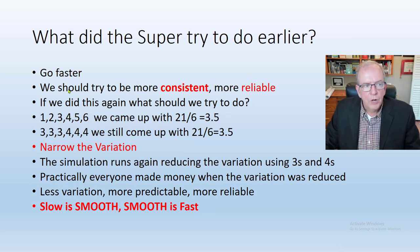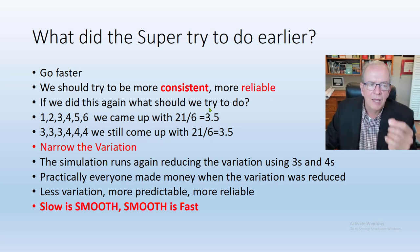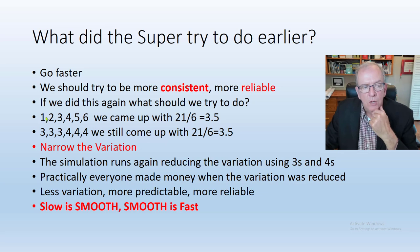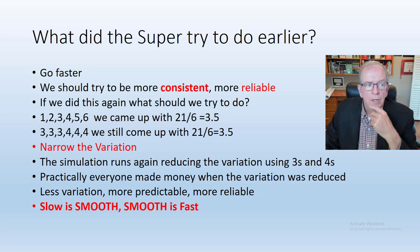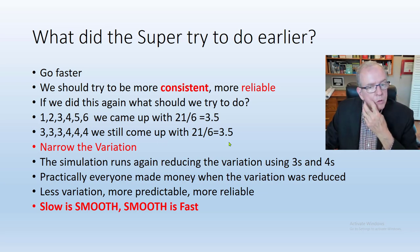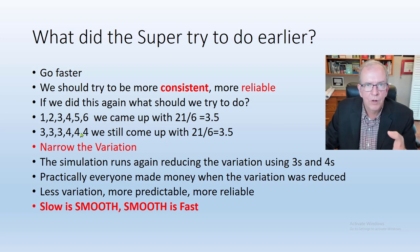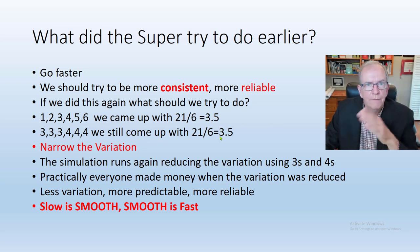The site superintendent tried to go faster. What we should try to be is more consistent and reliable. If we did this simulation again, what should we try to do? We have that single die — and if we were able to lessen the variation, even moving from a range of one-to-six to two-through-five by removing those extremes, that would improve the variation somewhat. Ideally, if we're able to get it down to only rolling a three or a four, you're going to come closer to that 3.5 average. There is some randomness, but you're still going to be closer to 3.5 than if you've got variation as high as one through six.